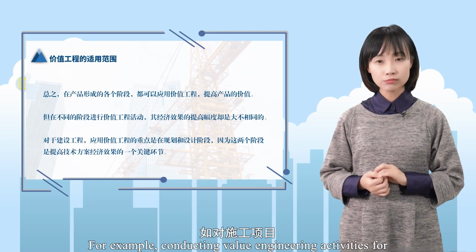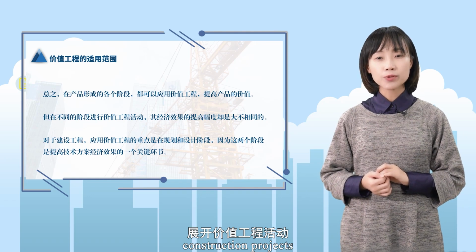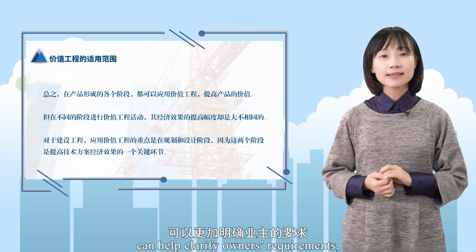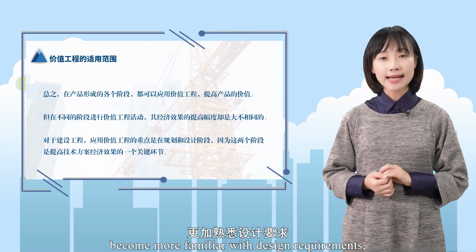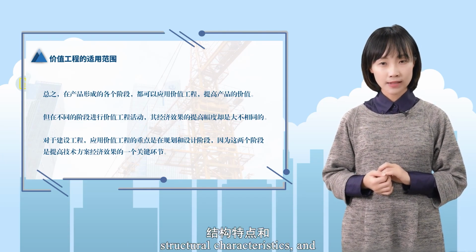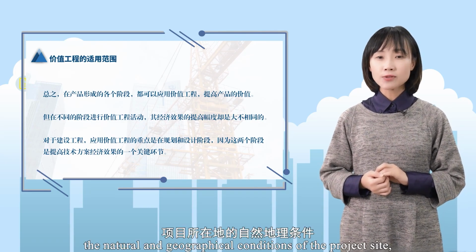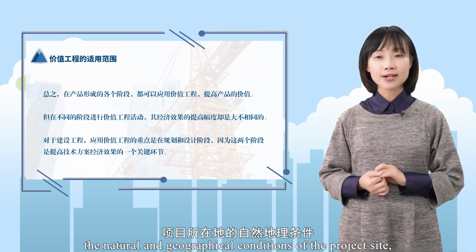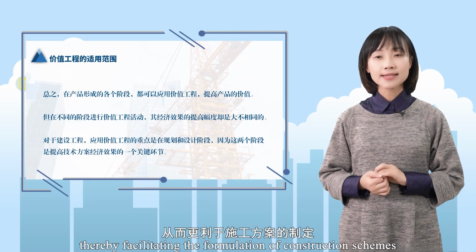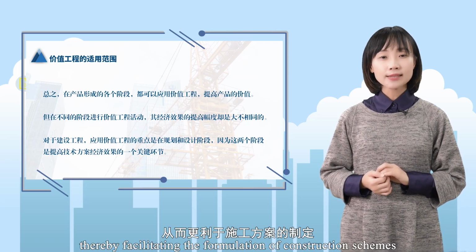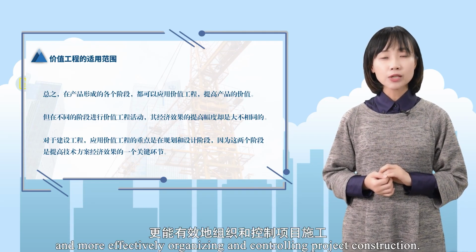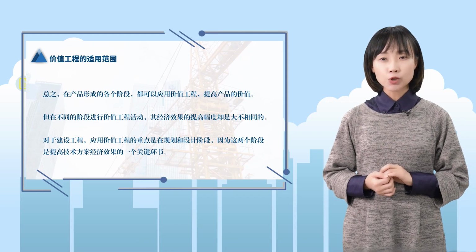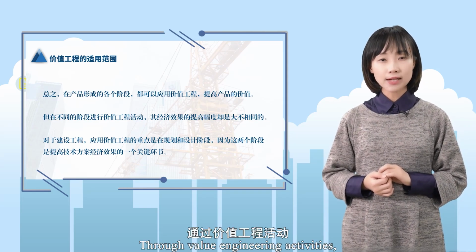For example, conducting value engineering activities for construction projects can help clarify owners' requirements, become more familiar with design requirements, structural characteristics, and the natural and geographical conditions of the project site, thereby facilitating the formulation of construction schemes and more effectively organizing and controlling project construction. Through value engineering activities,